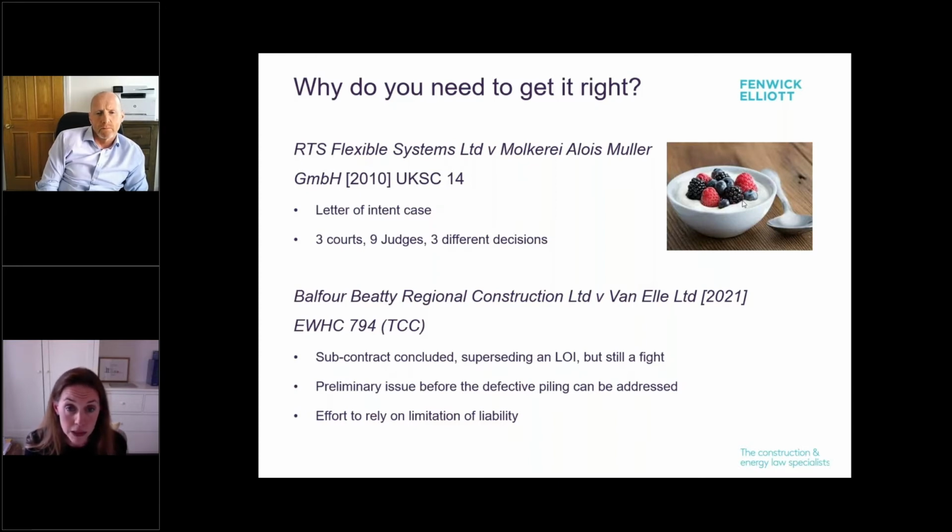The court had none of this. It said that on the documents, Van L had clearly wanted assurance that its quotation was accepted and they wanted something in writing. Balfour's had provided that in the form of a letter of intent, and that covered the North Carousel. And that letter of intent was eventually superseded and replaced by the subcontract, which in turn also covered the North Carousel works. So yet again, we have another issue where it's not clear what terms people have contracted on.